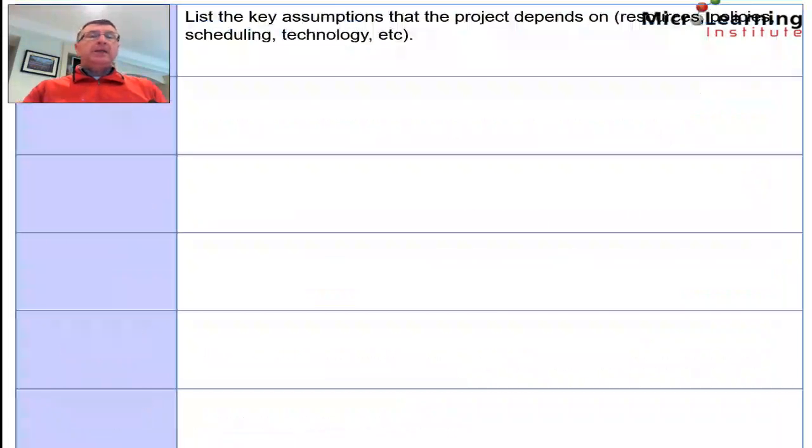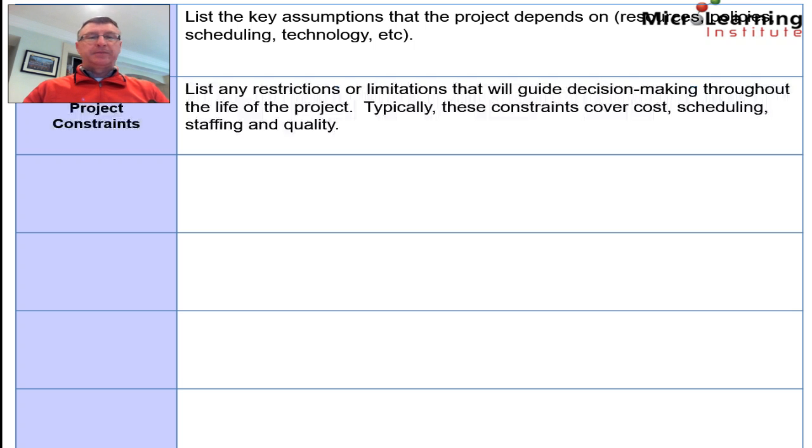In addition to these, in the charter, we might expect some details of project assumptions. So again, is the project manager making any assumption, i.e. that we'll be able to access a particular area for a particular period of time, or that the server is compatible with some software that we're designing? Are there any fundamental assumptions on which the success of the project is based?